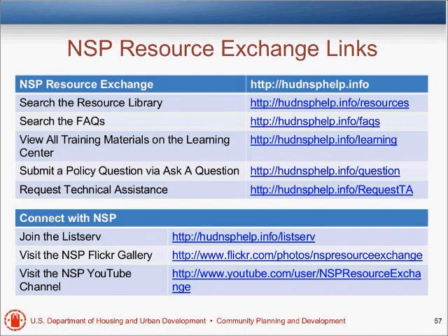Okay. And that means that acquisition and demolition and construction and rehab and infrastructure, site improvements, etc., are all the kinds of activities that are interrelated to the project. So it isn't just a matter of HUD funding one thing, but you have to look at the entire functionally related set of activities in the project.